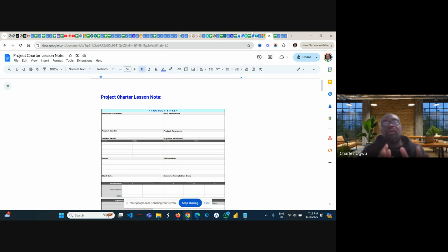And you set up a change committee board. After evaluation, if the change committee says yes, this marketing is important, we want the marketing in this project, that change committee will draft new updates that will be added to the original project charter, improving every other thing, maybe increasing the budget to make sure that the new changes are captured very well.